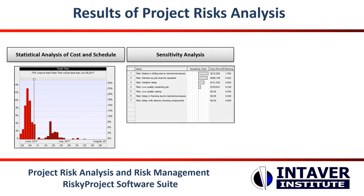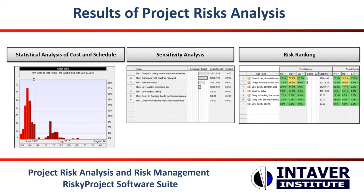Sensitivity analysis or tornado charts indicates which activity or risk parameters have the most potential to impact a project schedule. And finally, risk ranking — risks are ranked by their potential impact on a project schedule or cost.